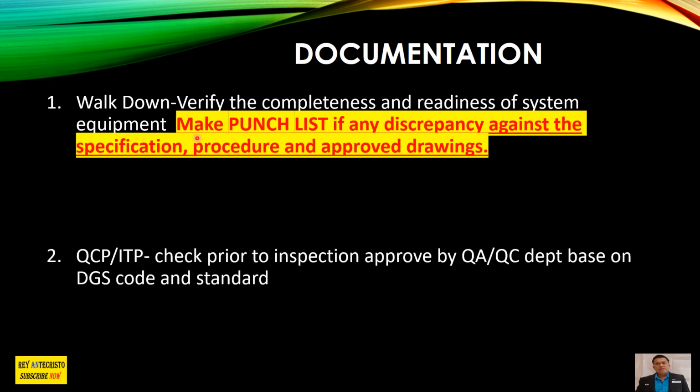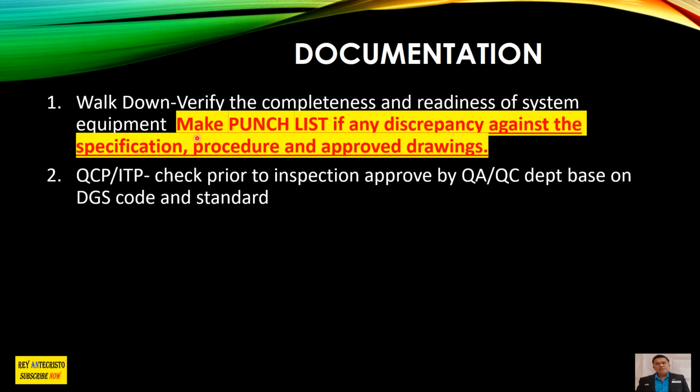Okay, and number two, you understand the QCP, quality control procedure, and ITP, inspection test procedure. Check prior to inspection approved by the QAQC department based on the drawings, code and standard.